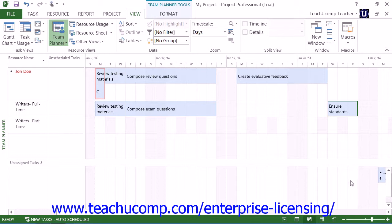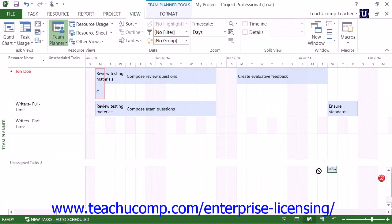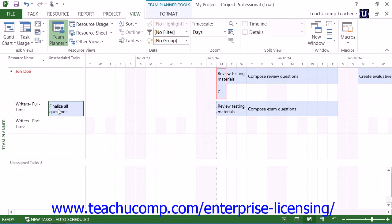Note that when you are dragging unassigned tasks into the top pane from the bottom pane, if you drop the task into the right pane for a resource row, it will be assigned to the resource in the resource row as well as being scheduled. If you drop it into the left pane for a resource row, the task is assigned to the resource, but is not scheduled.